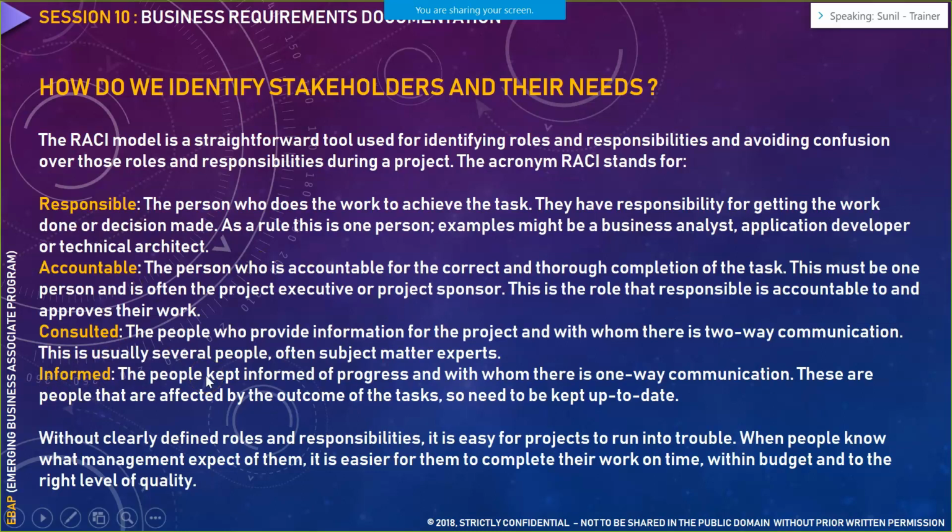For example, in a typical project, your delivery manager, your delivery head, your business unit head, these are the persons to whom you would always keep informing. Now, what you would be informing them, not the requirement document or the code or the test cases. You would be informing only about the project status. And essentially, in most of the cases, the accountable person, like the project manager or project executive, does the informing part.